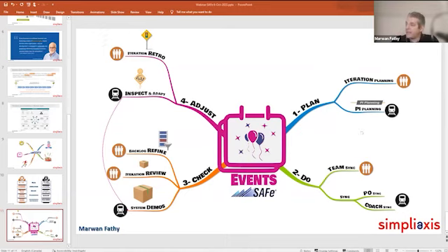So the PI planning event, the event for the art, it's a 2-day event. Everybody's invited, more than 100 people in the room. We plan what we'll be working on in the coming 6 weeks, 8 weeks, 12 weeks, whatever, depending on our cadence. And we come up with what will be the features we will be delivering. And each team should come initially with half-baked iteration goals for the coming 2 iterations. Does this answer your question, Sally?